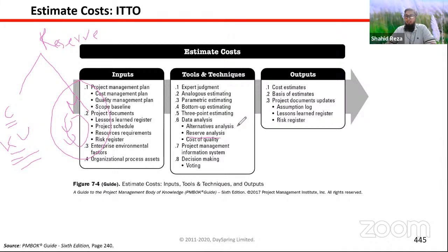So say natural calamities, earthquake. All right. These are the things that we actually cannot forecast. So for that, sometimes we keep a management reserve. Both that cost related reserve you have to keep, and you have to add it with all the activities, all the work packages. So if anything goes wrong, this money can help you.